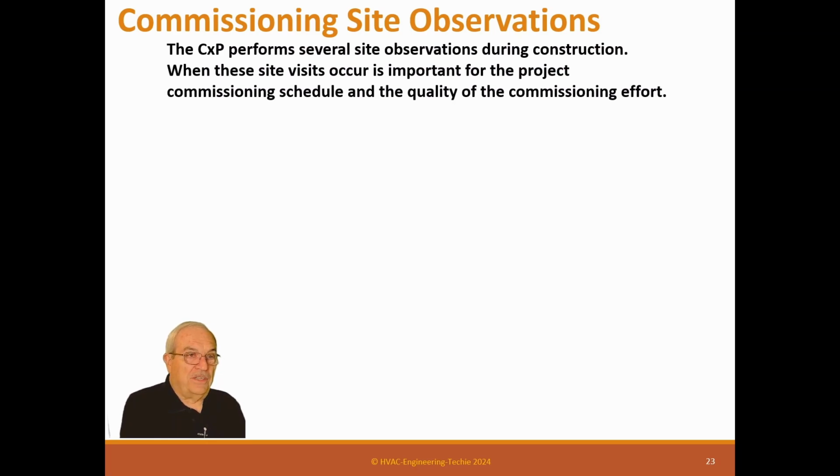The process guys actually use the installing contractor to do the inspection, and that's worthless, because the guy who installed it, if he didn't know and installed it wrong, he's not going to know to inspect it and see that it's wrong. So that can't happen either. So it's a problem.